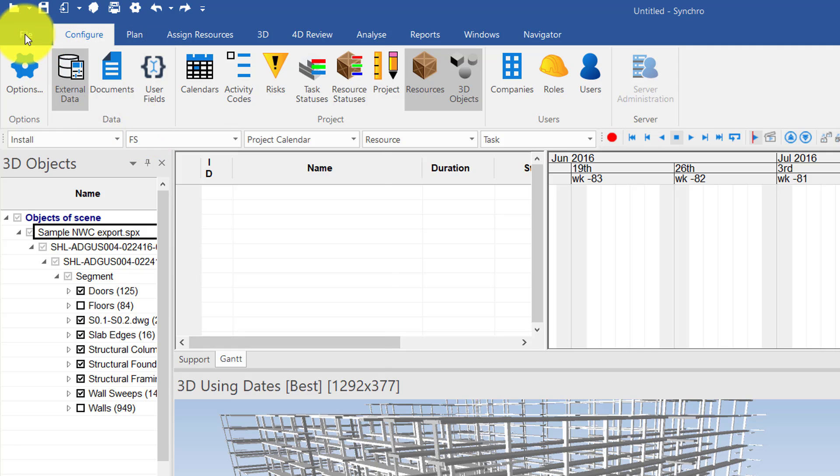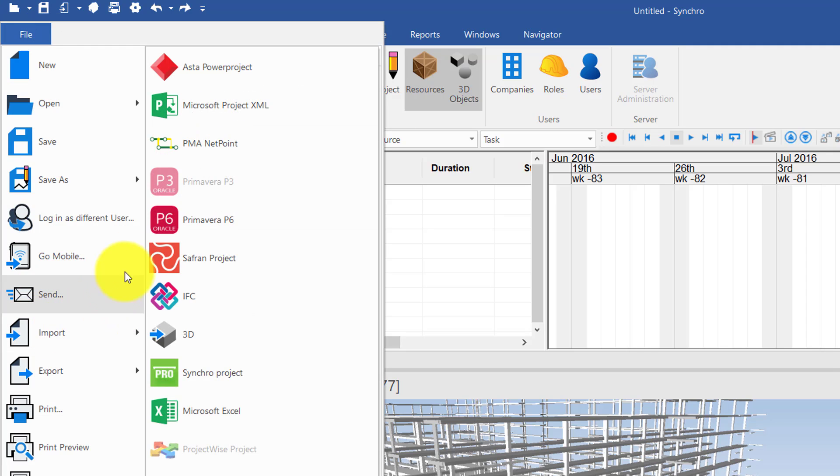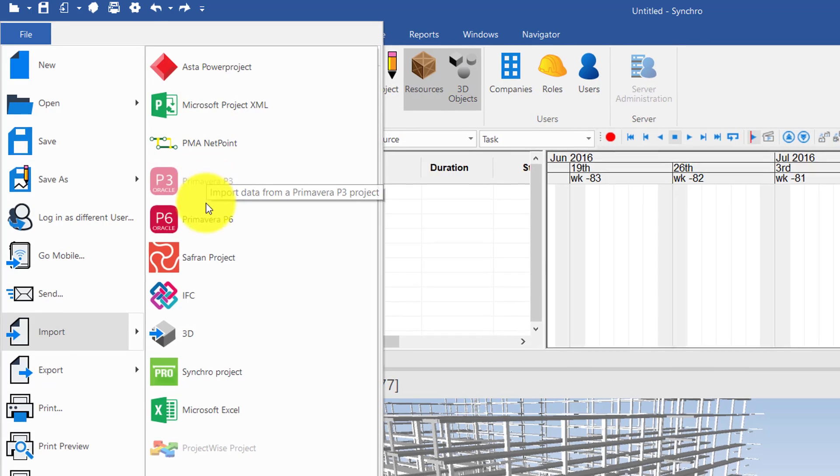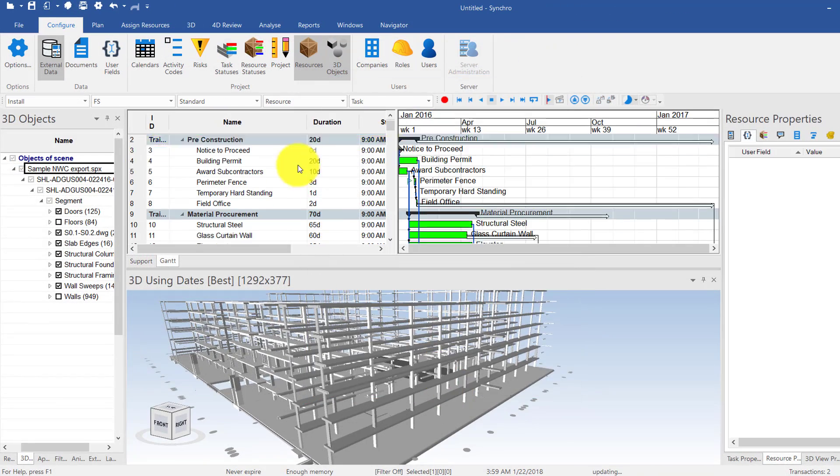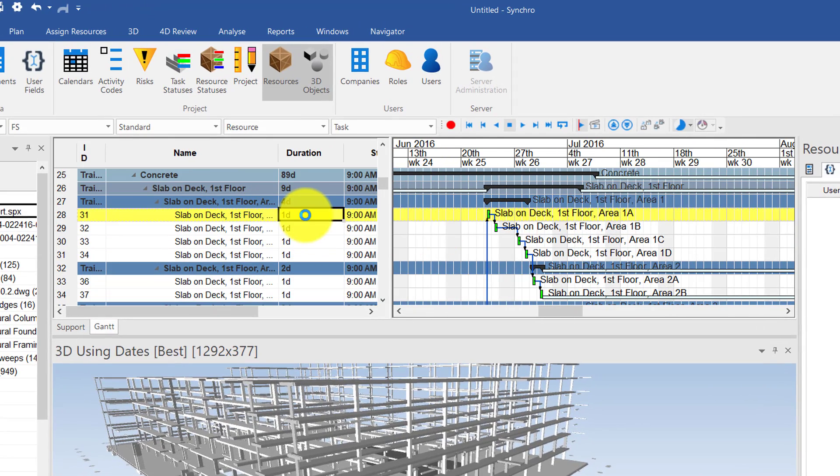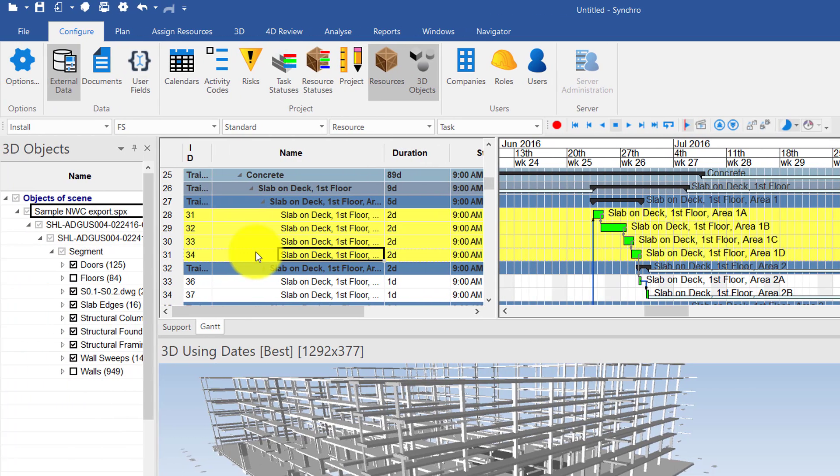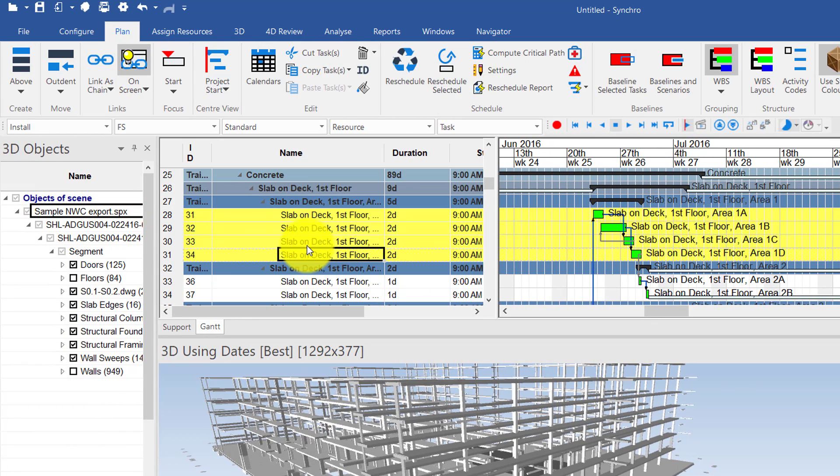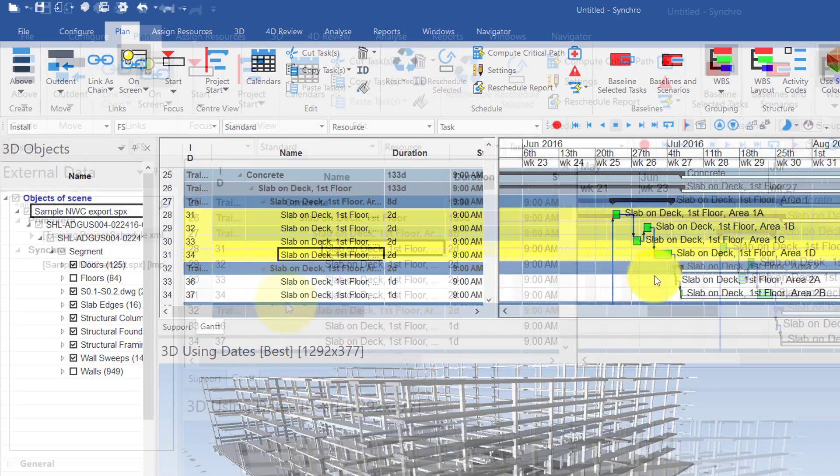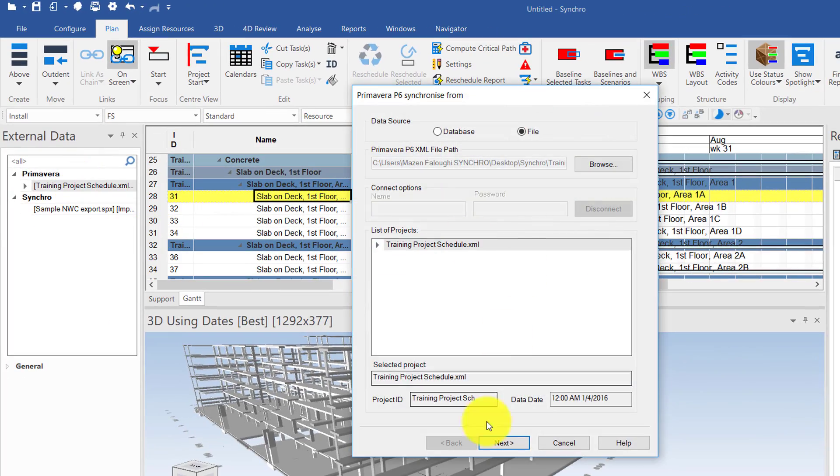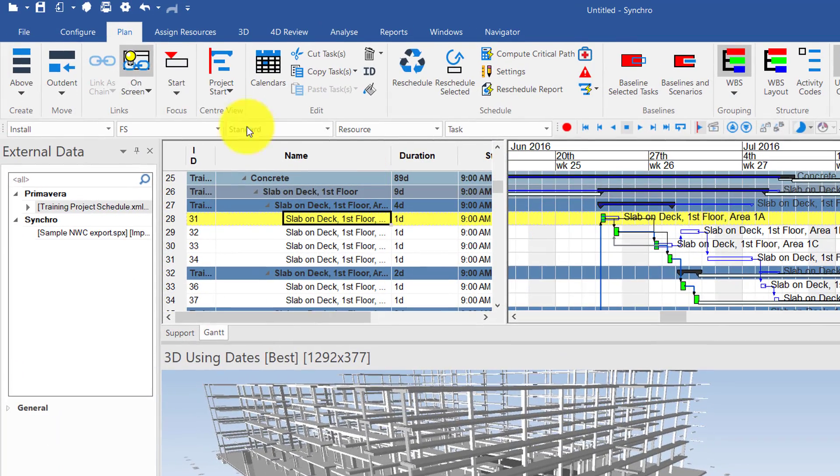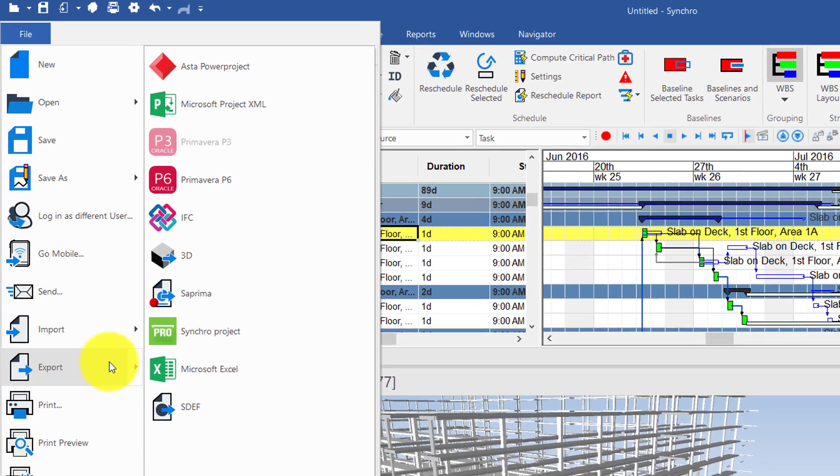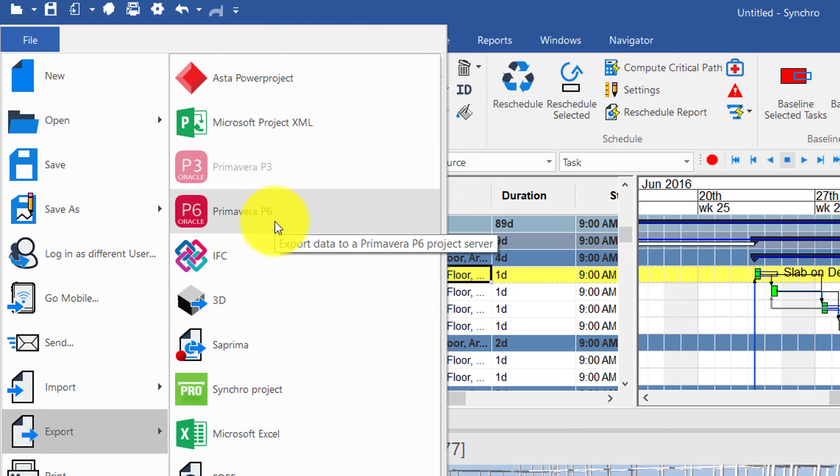Then you'll have to decide whether you want to import an existing schedule that you have, say in P6, Microsoft Project, or even Asta, or simply use the models that you've imported to create your own schedule from scratch completely inside of Synchro Pro. Either way, Synchro Pro has a state-of-the-art CPM scheduling engine that you can use to make schedule modifications and optimizations. You can synchronize with the updated versions of the imported schedules without losing any work, and you can even export the changes that you made in Synchro back to those scheduling packages if you so choose.